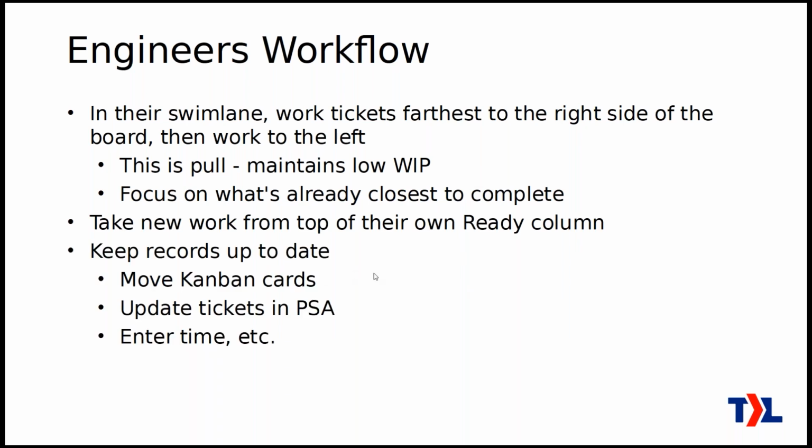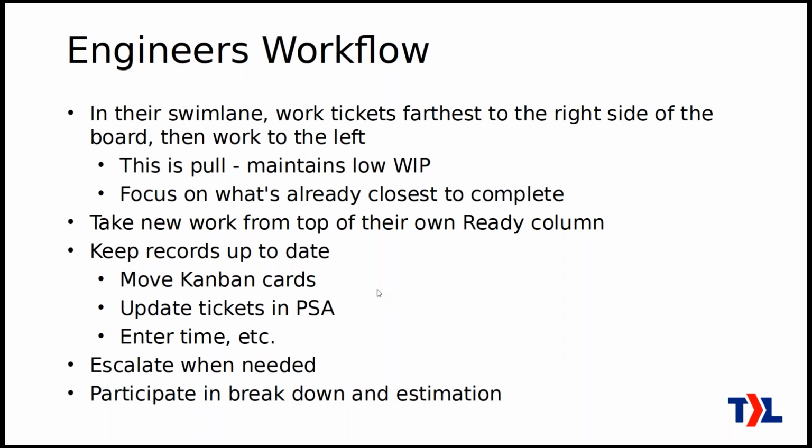And they're also going to keep all the records up to date, regular stuff that they should be doing already. They're going to be moving those cards, making sure the statuses are correct. They're going to be updating the tickets in the PSA with the notes and time, and they're going to escalate those tickets when needed. They're also going to participate in work breakdown and estimation. You may actually make tickets for them for that, to say, okay, I'm going to perform the estimate work for certain tickets in this project, and then assign that to an engineer, and then you know that the engineer will do that estimation work for you.